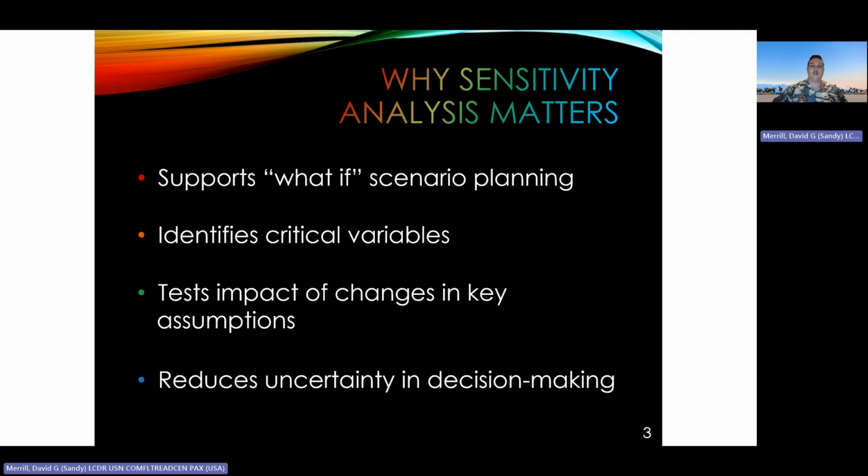At its core, sensitivity analysis answers what-if questions. For example, what if sales drop 10%? What if interest rates go up? After identifying critical variables, we can tweak them in simulations one at a time and see how outcomes like net present value, NPV, or internal rate of return, IRR, shift.